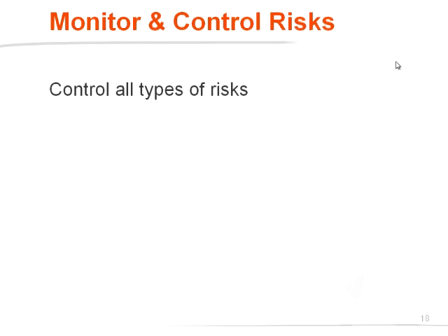And depending on the situation, you have to call a meeting to discuss risks. You can have a risk identification workshop, and if the probability of a very dangerous risk occurring is getting higher, then maybe it's good to have a stand-up meeting even several times a day.